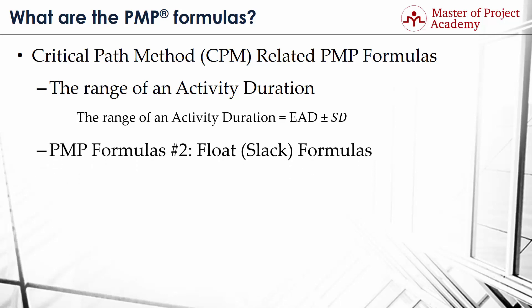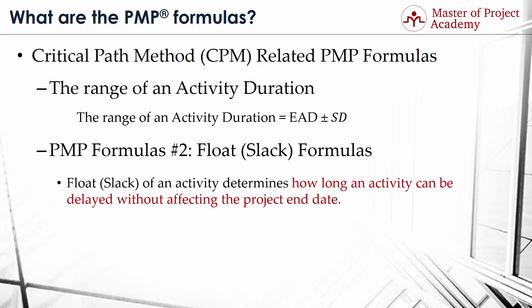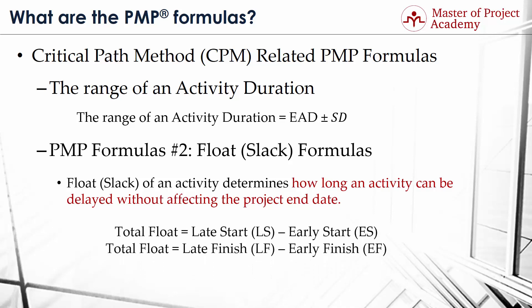PMP formula number 2: Float or Slack Formulas. Float or Slack of an Activity determines how long an activity can be delayed without affecting the project end date. Accordingly, if an activity is on the critical path, the float or slack of that activity will be zero. In order to calculate an activity float, first we determine Late Start (LS) and Early Start (ES) values of the activity. Alternatively, we may use Late Finish (LF) and Early Finish (EF) values. The formula for total float is: Total Float equals Late Start minus Early Start, and Total Float equals Late Finish minus Early Finish.